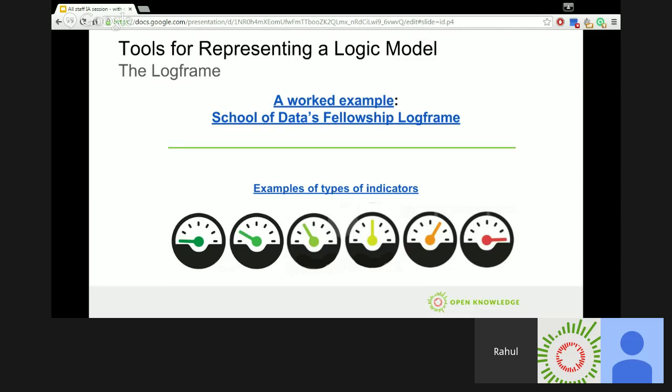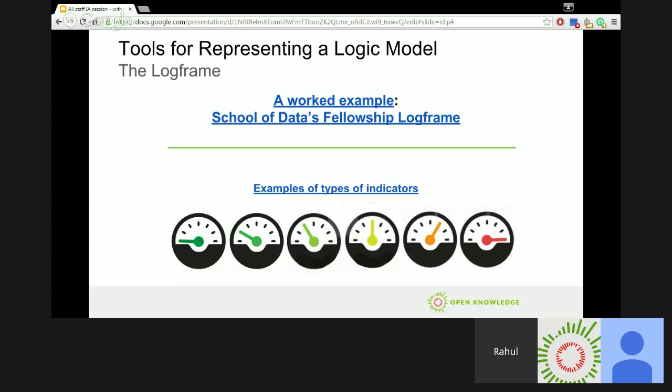The last column, means of verification, contains statements that specify the source of information or data for the measurements or verification specified in the indicators column. It may be helpful to first think of all possible means that may be useful to collect this necessary data. I'll be going through later how you can collect data, the different methods, things like focus group interviews, surveys, and so on. It is recommended to use a mix of qualitative and quantitative data for M&E purposes to negate weaknesses inherent in either of them.